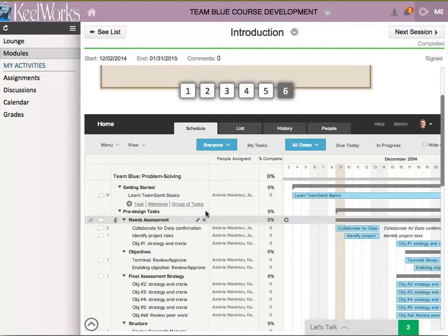You don't have full power to use this right now. We can talk about why later, because people have, without realizing it, accidentally deleted stuff. But you'll be responsible for putting a percentage here on how much this task is complete. There's like 5 people on a task. That means you're only responsible for 20% of that task. So if it says 40% and you've done yours, you want to add 20 to make it 60, right? So you're never going to put in 100% because there are multiple people assigned.